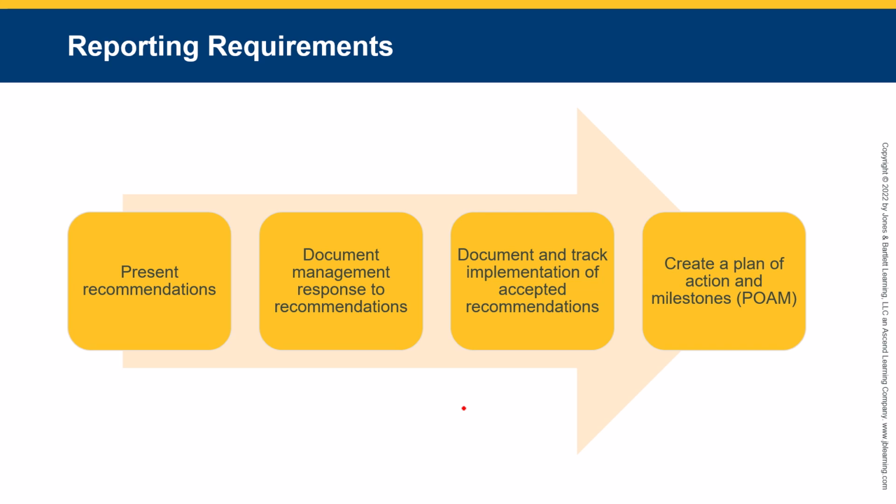Then we deal with the reporting. Present the recommendation. Document the management response to the recommendation. Document and track implementation and the accepted recommendation. Build out your plan of action and milestones. That way, you have your timeline, you have your actions, you have your milestones, you have a project that you can then focus and complete.